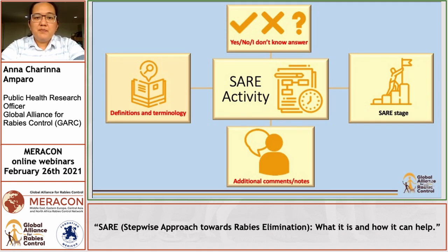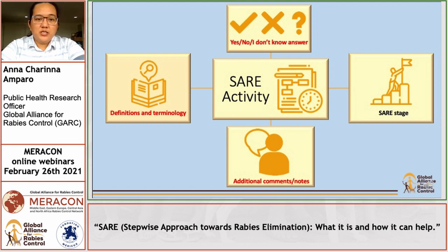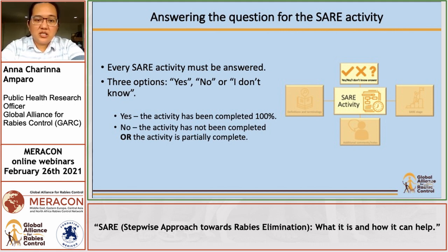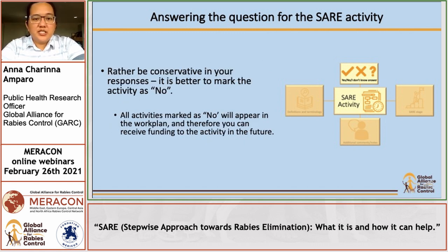There are four main details you will encounter when completing the SARA assessment. First are the questions answerable by yes or no, definitions and terminology, some comments or notes, and the SARA stage. It's very important that each activity has been answered by yes, no, or I don't know. We define yes as the activity having been completed 100%, and no means the activity has not been completed or is partially complete. It is better to be conservative in your responses — it's better to mark the activity as no, because partially completed activities marked as no will appear in the work plan and therefore will be earmarked for funding in the future.